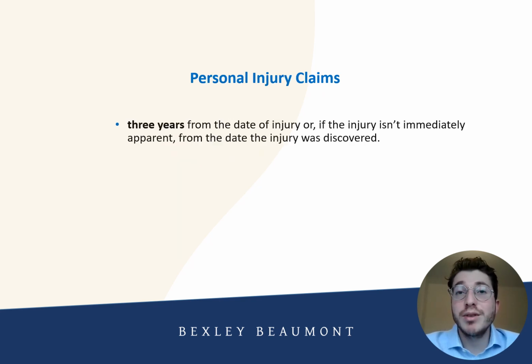Well, what about personal injury claims? Well, for any personal injury claims arising from construction activities, the limitation period is 3 years from the date of injury, or if the injury isn't immediately apparent, 3 years from the date the injury was discovered. So again, it's that 3-year period discovery rule that applies.